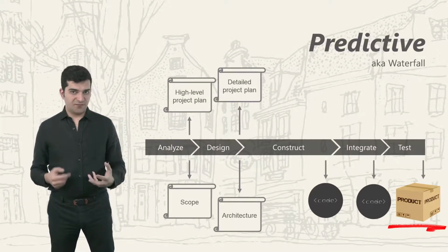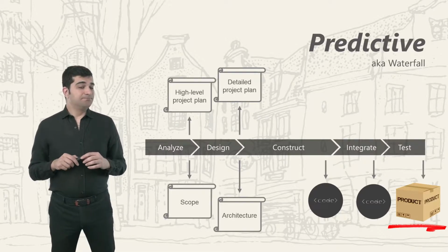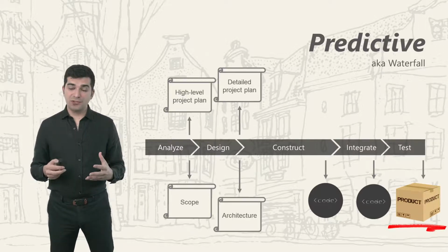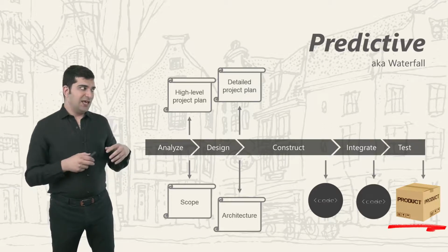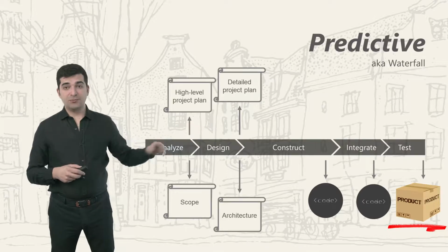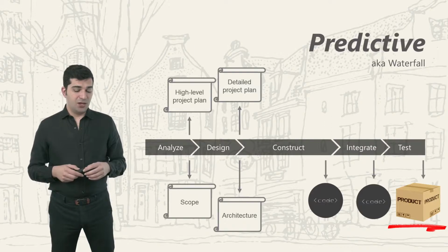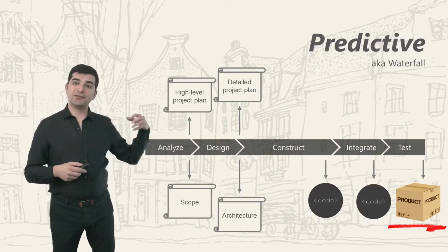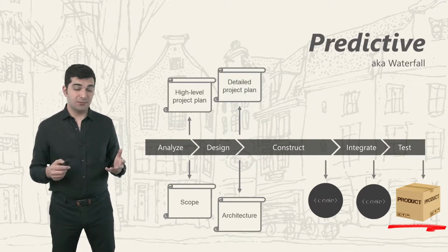That works, that's fine. But there are some types of projects out there, yes, IT development, where it doesn't matter how much time you spend in the beginning of the project thinking about what you need. If the customer is going to see the product only at the end of the project, you will be in trouble. Because based on experience, it doesn't work on paper. They have to see the product. That's when they realize what they really want. That's a problem that we have.